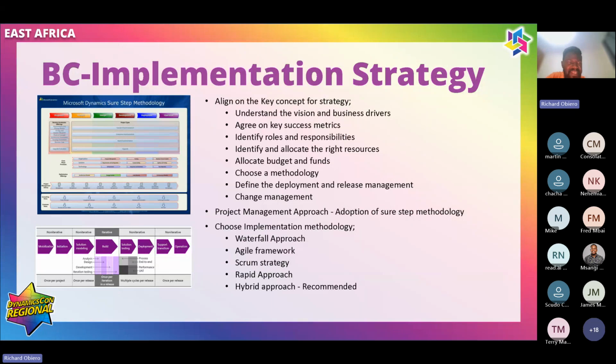So you have senior managers, and then you'll have functional heads also involved in this meeting. So you need to know the decision makers. Decision makers need to sit at the steering committee level. Then you need to know the process drivers, not the manager, not the head of, not whichever unique position titles people get, the process drivers. A process driver can be a production supervisor. A process driver can be an engineering officer, and not the head of engineering.